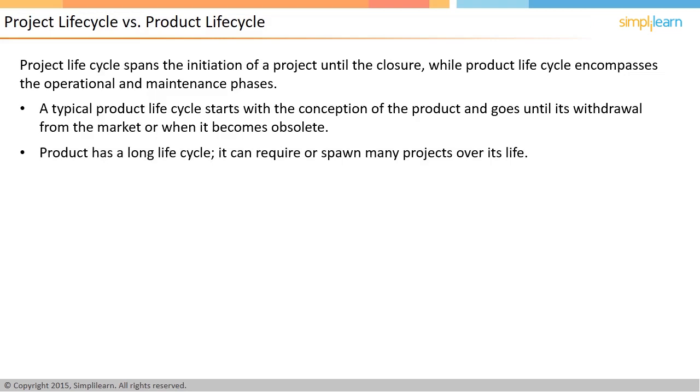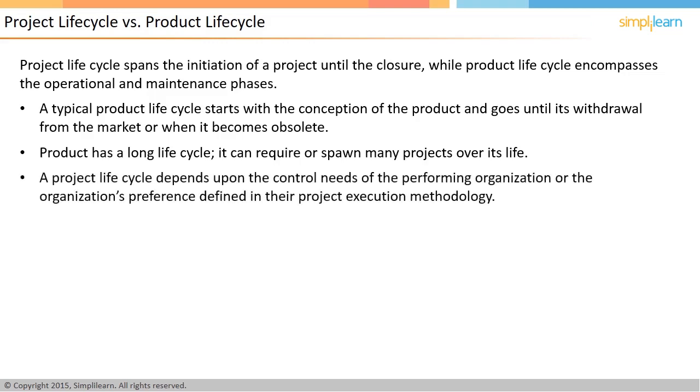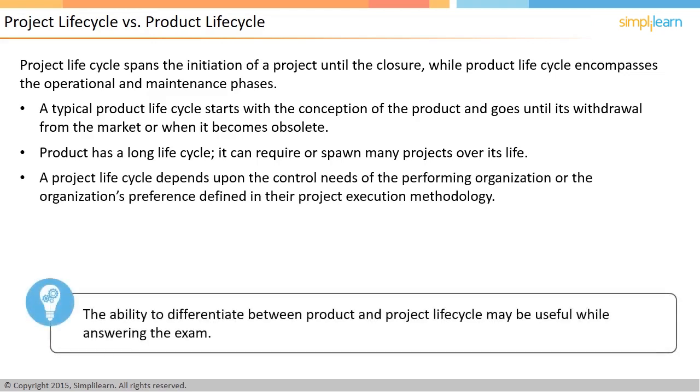For example, a project in product conception phase could be to determine customer needs, whereas a project during product maturity phase could be used to perform competitive analysis. Typically, a product lifecycle is longer than the project lifecycle. A project also has its own life cycle, and this life cycle depends upon the industry and the organization within which the project is being executed. Sometimes different organizations within the same industry use different life cycles.